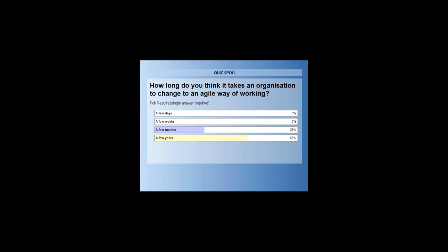To give you an indication, a customer I was talking to recently was listening to the webinar, and I made it very clear that if you're a company of, say, 500 or 1,000, to get some real benefits from an Agile transformation, you'll be looking at 12 to 18 months before you start going, wow. Don't get me wrong, within 2, 4, 6 months you can get some benefits and some wins. But you suddenly start, as the expression goes, cooking on gas when you're 12 to 18 months down the line. So that's the sort of timescale I want you to look at.